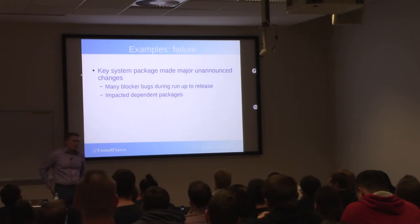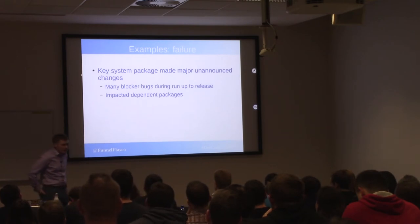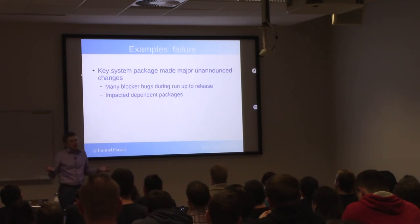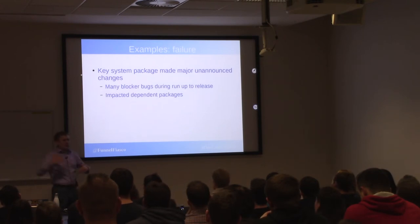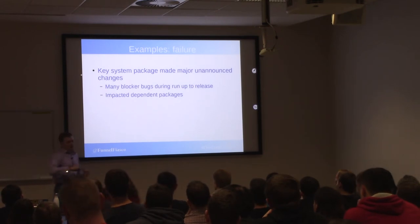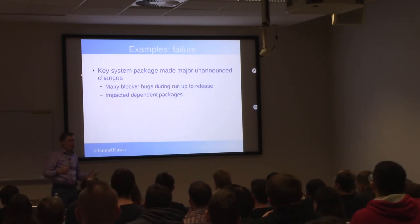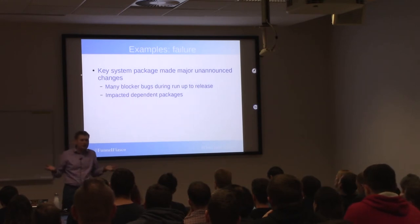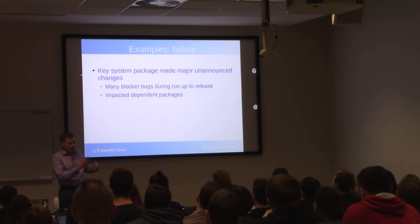Sometimes people don't follow the process. A key system package made some major unannounced changes, which brought up a lot of blocker bugs that we didn't notice right away. As we got closer to the release, we found things weren't working, and they submitted some fixes but also had some new features that created more problems. There were packages dependent on that package, so it ended up as a hero effort from QA and the dependent package developers to try and get everything working so we could ship something approaching on time. We sent them an email saying it's really good to at least let us know changes are coming so people can be prepared when you change your API.